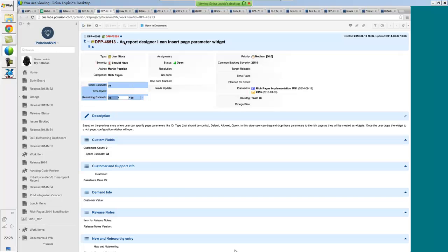And what we also do, as we get more into the sprint management, is revisit estimations before the sprint starts. The reason for this is to see if things have changed, if we have already learned something from working on this project, and how this actually reflects on the estimates.